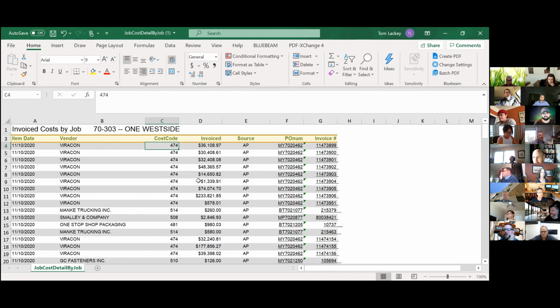And we're still only doing this when invoices are required, or are you saying we're going to submit invoices and mark it up 20% whether they ask for it or not? No, if you're not required to do invoices, don't provide them, but you should still be looking at this. This gives you an idea of what your stored materials are. Right. And throw 20% on it, and it gets you in the ballpark, right?